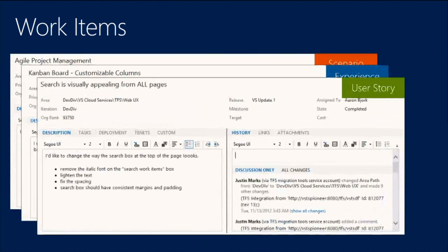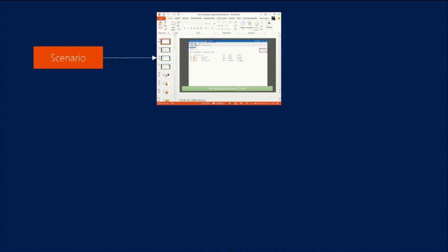I'm going to flip through these. These are the work items that they are. So this is how it works. We have a scenario, and a person gets assigned as a scenario owner. It's typically someone that's a little bit higher up in the management chain, a more senior person. That person coordinates creating a storyboard. We use our own storyboarding tools for PowerPoint, and we create these storyboards that are meant to tell, hey, this is the value provided to the customer visually. We kind of present it visually.